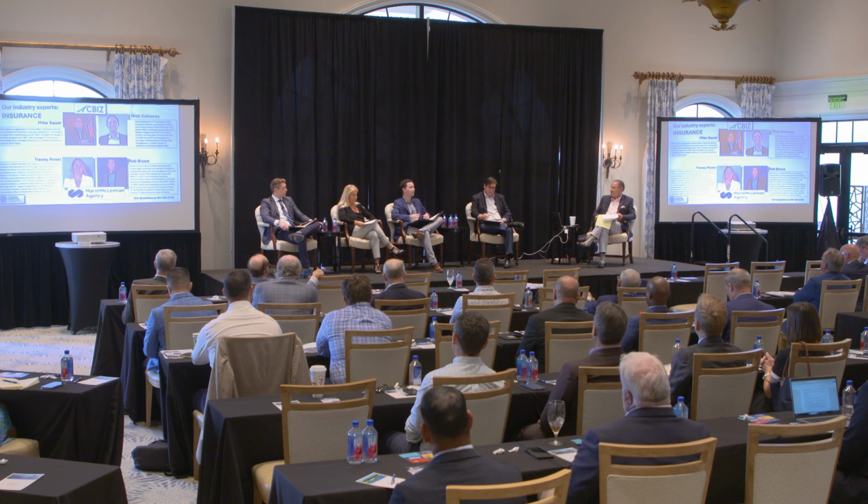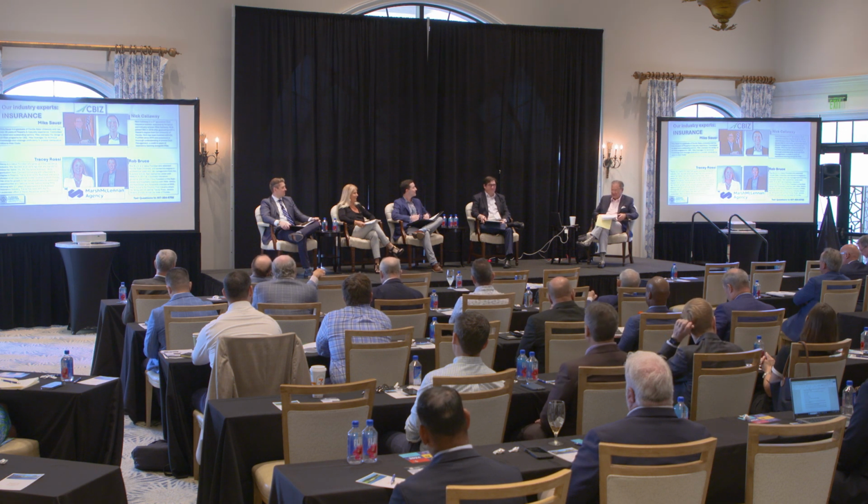And so if you were going to do a project that only takes six months, maybe try to start it in January and end it in July, and potentially you don't need to buy the wind insurance on that project. You just have to think about the consequence with membership. Well, yeah, exactly.